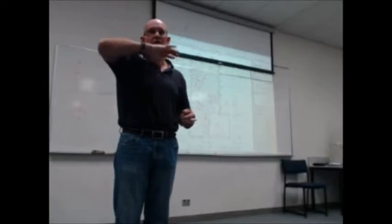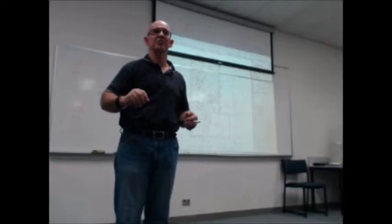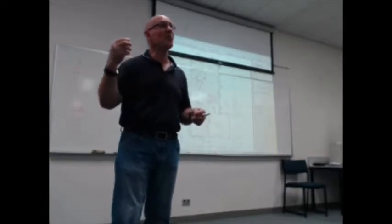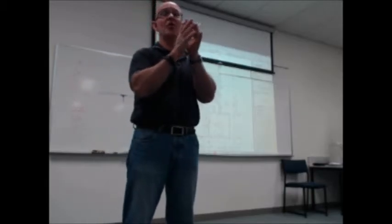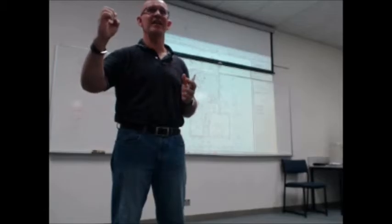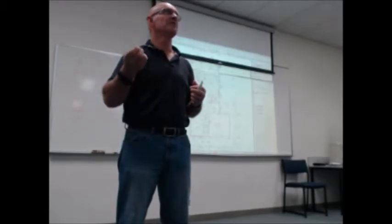So the whole of the ensuite had to be cleaned out, ceilings underneath had to be patched, plastered, painted, in a brand spanking new million-dollar unit. So it doesn't matter what happens, you might do something 100% right, the next trade that comes along is only doing 90-95%, you're going to wear that fault. And you've got to prove it's somebody else's fault.